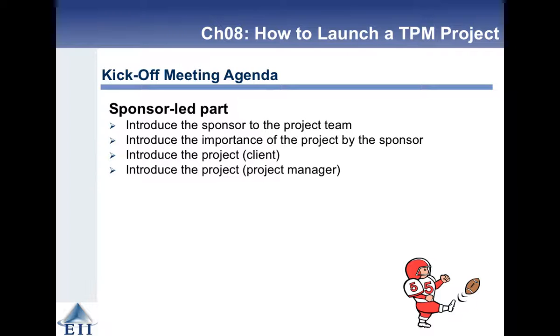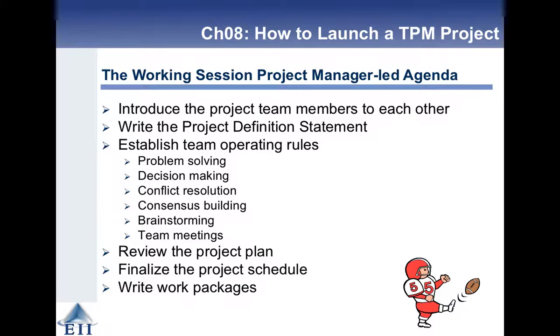So when you kick it off, you want to first of all introduce the sponsor, the importance of the project to the sponsor, the project, and the project manager, right? And then you've got to take what came into this launching meeting, which is the project proposal, and write the project definition statement, which is a slightly different document.